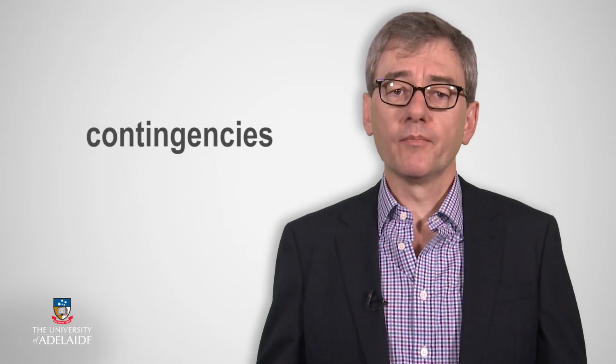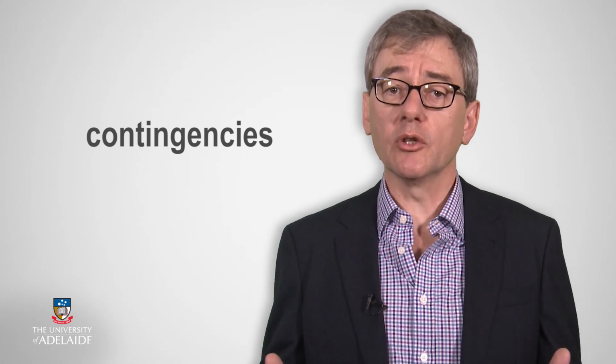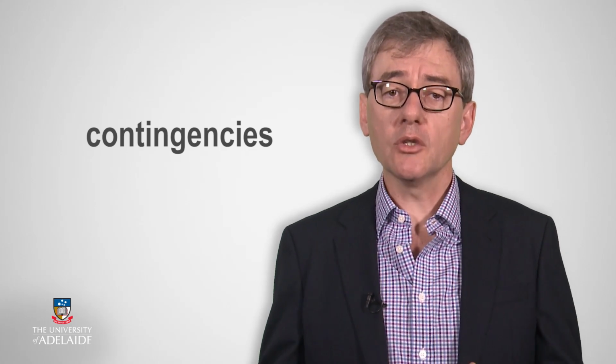Whenever there is a dependence on external suppliers, the possibility exists that one or more of these suppliers may not fulfill their deliverables on time or at the specified cost. Anne's response might be to put some contingencies in place in case one or more of these suppliers do not complete their required deliverables on schedule. A contingency example in this instance might be bringing the due date forward for suppliers, such as the wedding dress and the wedding cake, to ensure they complete what is required well before the actual date of the wedding.